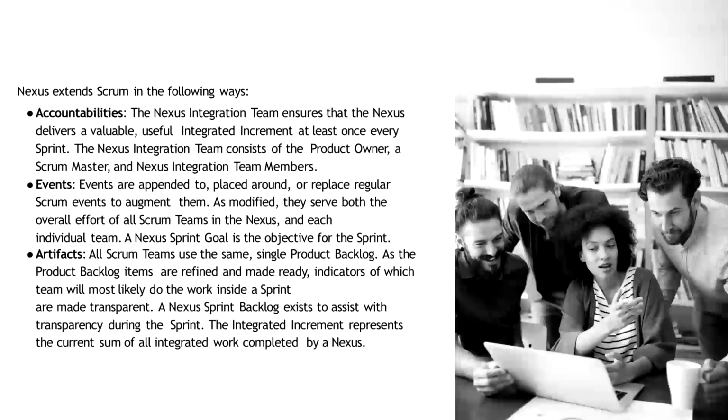Accountabilities. The Nexus integration team ensures that the Nexus delivers a valuable, useful, integrated increment at least once every sprint. The Nexus integration team consists of the product owner, a Scrum Master, and Nexus integration team members.